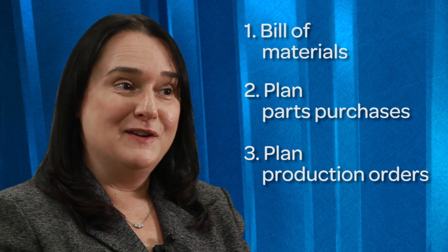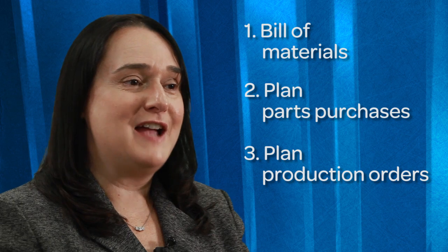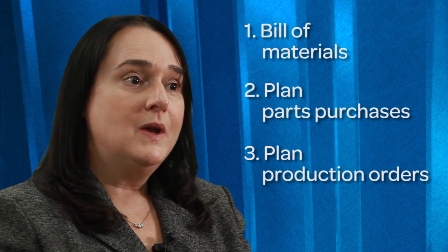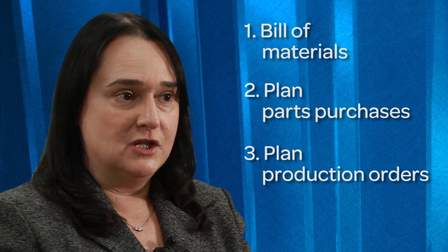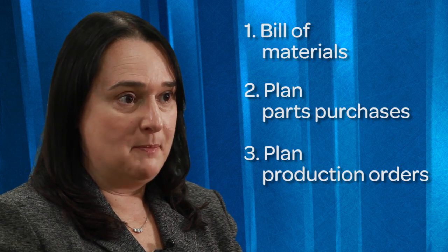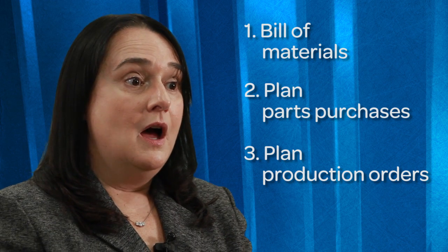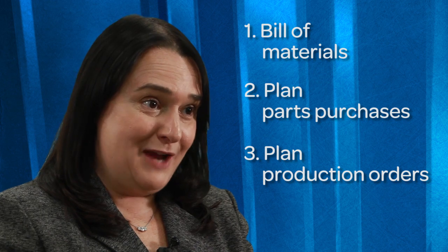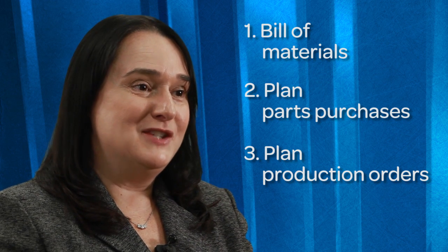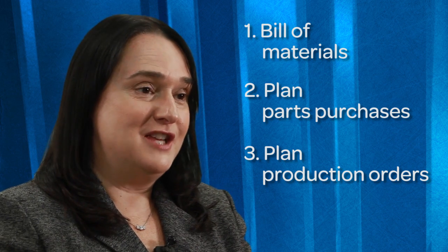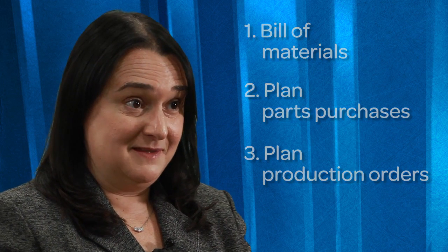Looking at the bill of materials, because we manufacture highly complex, highly engineered products, we go through a lot of iterations, a lot of changes, and we must be able to react to these changes properly. Whether they're customer changes or changes that the engineers are doing, the auditors are going to look for a 98% accuracy. So they're going to really come in and scrutinize how you process engineering change orders and how these changes affect the cost of your projects.